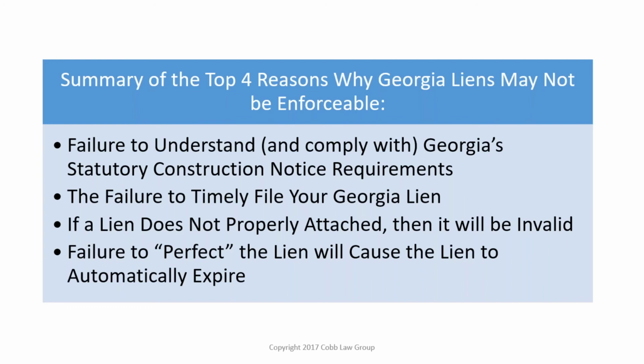So real quickly, the summary of the 4 reasons why Georgia liens may not be enforceable. First one is failure to comply with Georgia's statutory construction notice requirements. Second one, timely filing of the Georgia lien. Be very mindful of the lien waivers and that 60-day deadline. If the lien does not properly attach, then it will be invalid. And then you also have to perfect the lien, otherwise it will expire and be meaningless.